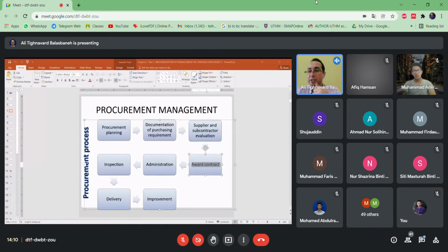Mohammed, I agree with you. 3 is better, but there is an exception: when you have experience, you know the supplier, and also the material you requested is not available in every company. Maybe you need some special sort of ceramic that needs to be imported from Italy.